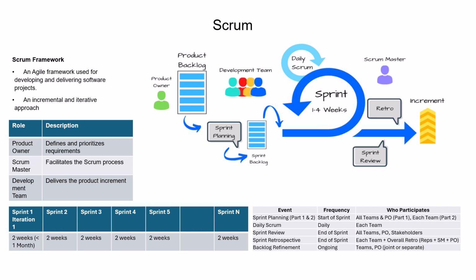This is where the team, the product owner, the Scrum Master, who manages and is kind of a project manager here, and also the development team together, they meet and start planning the sprint, where they start pulling requirements from the backlog. They pull enough requirements that they can finish in 10 days. So maybe they pull 3 or 4 requirements based on how much they can finish, and that's on day 1. Then in 10 days they develop the code for those requirements.